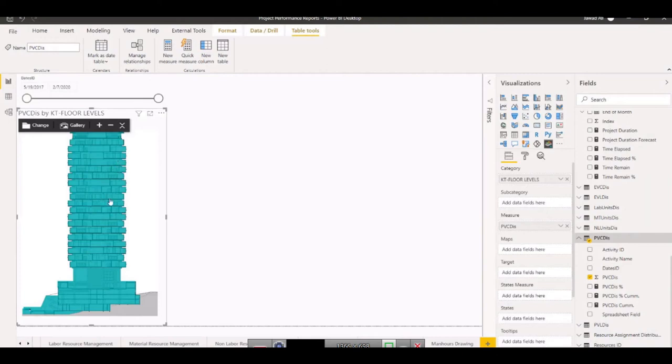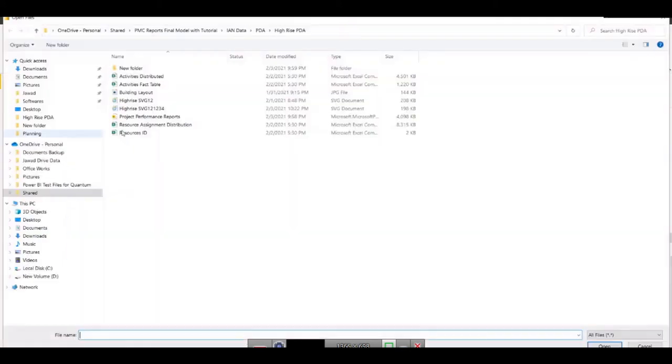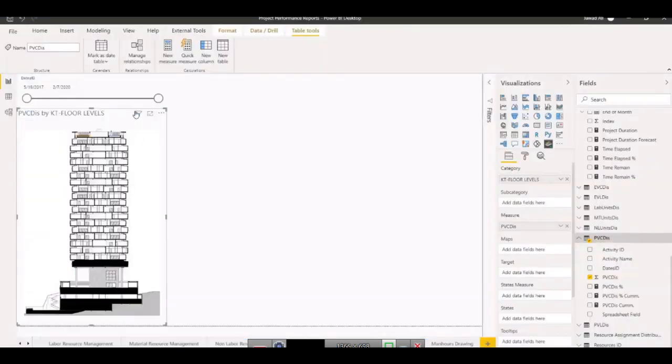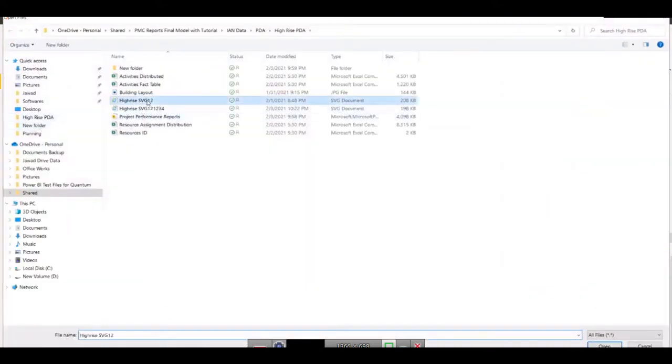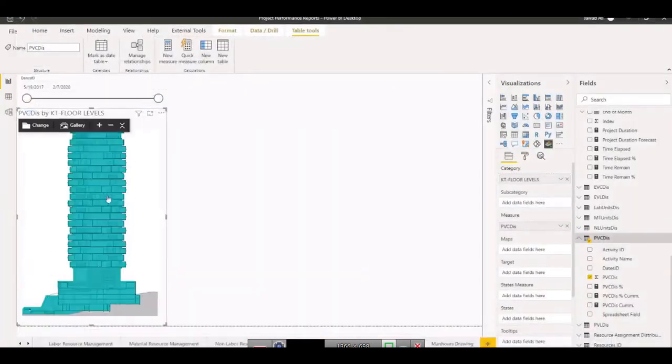If the activity codes do not match, like this code not matching the codes assigned to this part which we did in Inkscape, it will not be highlighted, it will not give you anything, it will be black. For example, if I bring this part now, you see it will be black like this. It is not matching any code here. So you need to make sure that the codes are perfect. Now it is fine.